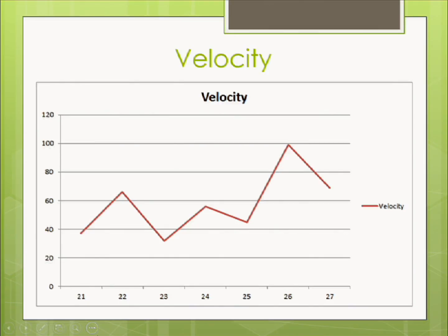So again, velocity is affected by all these different variables, but capacity is better. So what I do when I'm doing this, I start with a gut feel. I think we can do 60 hours this iteration. And we break it up by the disciplines, like 30 hours of dev and 20 hours of testing and all those different things. We're going to estimate all that stuff out and come up with a capacity estimate. I'm also going to estimate some of these other internal metrics myself, of what I think they're going to be based on my 60-hour estimate. So I'm going to estimate, like I said, the work that comes into the iteration after the iteration starts. This could be bugs, it could be production support, it could be anything.